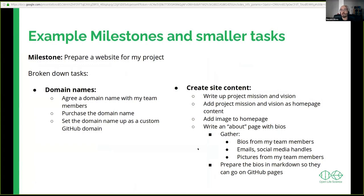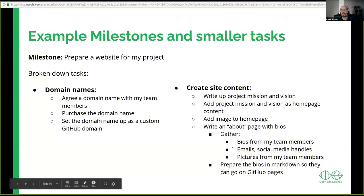In general terms, what are these issues and what could you make into an issue? For instance, if you wanted to make a website, you could break it down into creating content for the website, as well as finding a domain to use as the address for your website — where you would decide what domain that would be, agree between everyone, purchase that domain, and set it up as the redirect for the GitHub account. Similarly, you would create the content, thinking through different parts of how you would go about it and different sections of your website. You can think of each of these bullet points as an issue, and the inner ones as checkboxes on GitHub.